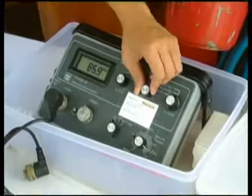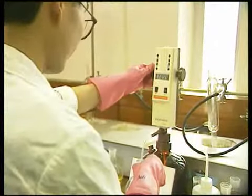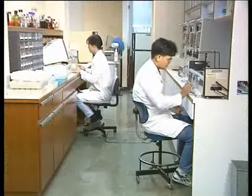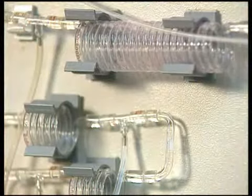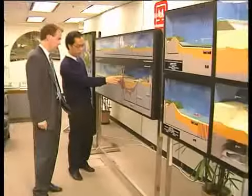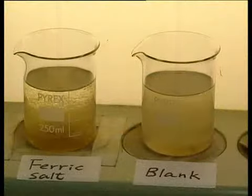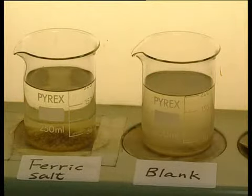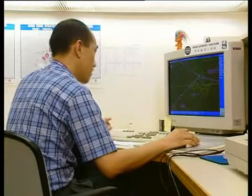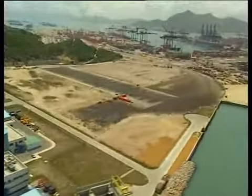Before any construction work began on Stage 1 of HATS, a program of extensive water quality monitoring and hydraulic modelling was carried out. This primarily comprised mathematical and large-scale physical modelling, in which the future infilling of the harbour was modelled and the effect on water quality assessed. Pilot trials too were conducted to determine the most effective chemical sewage treatment. With the completion of the engineering study in place, eventual construction work commenced in 1994.